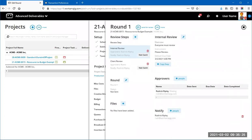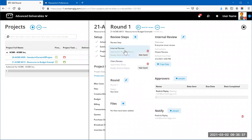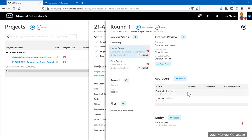A basic deliverable is split into two parts: internal review and client review. These two steps are done in succession. For the internal review, you designate approvers. A person on the notify list gets notified when the round is complete — meaning if you send four total rounds of review, that person gets notified at the end of each round.